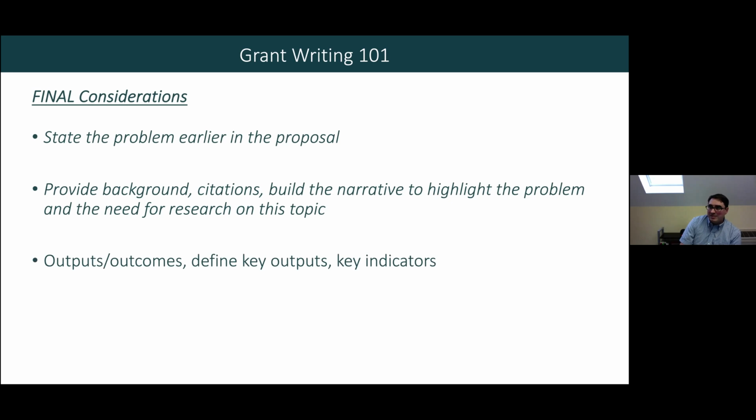Outputs and outcomes are not the same, they're different, okay? But define them, define the key outputs, and think very clearly about the outcomes. In many situations, those outcomes are how what you're planning to do will make an impact. You will probably be developing a new decision tool, but the outcome is that the decision tool will be utilized by 5% of the people and increase productivity by 1%. Those numbers and the impact are more related to the outcome.